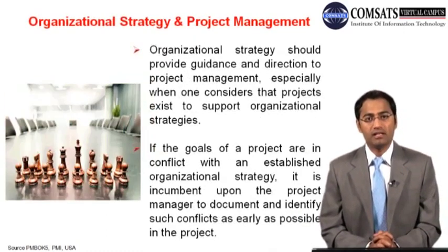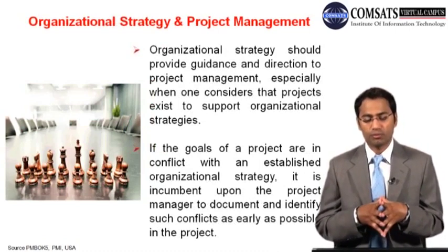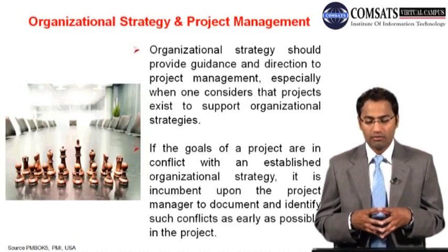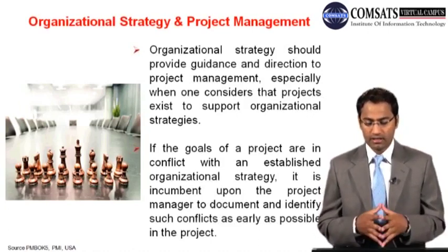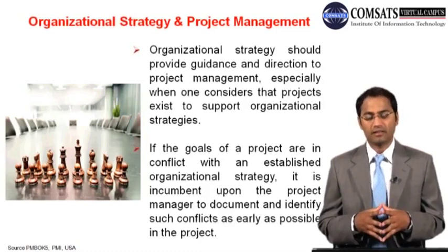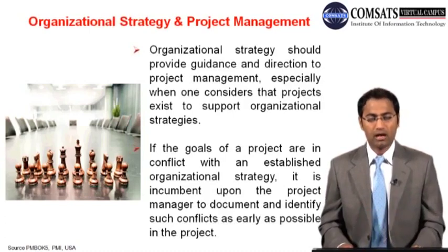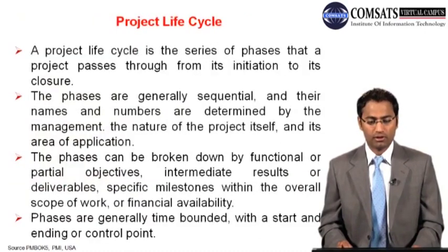And organizational strategy and project management are also very much related. Organizational strategy should provide guidance and direction to project management, especially when one considers that projects exist to support organizational strategies. If the goals of a project are in conflict with an established organizational strategy, it is important for the project manager to document and identify such conflicts as early as possible in the project and bring them to the notice of top management, so that they have commitment for the project.